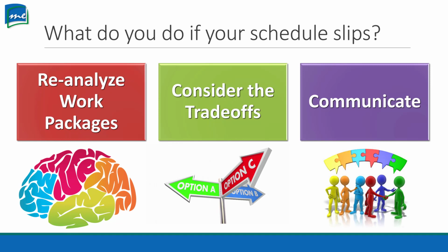However, you might have to consider the trade-offs here. If one activity is critical, part of your critical chain, you might have to look at what activities are going to be affected, like a domino effect. So if things are shifted 1 week, how does that impact your final completion date?